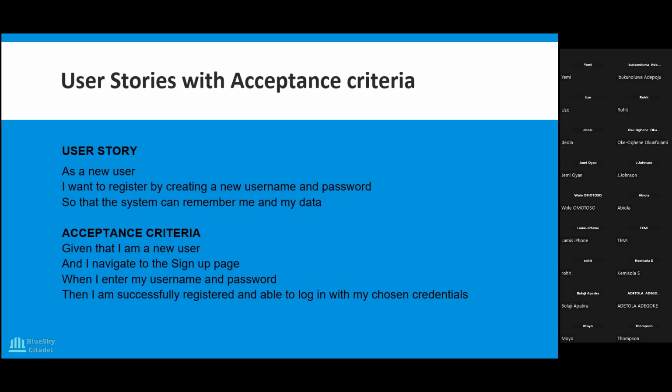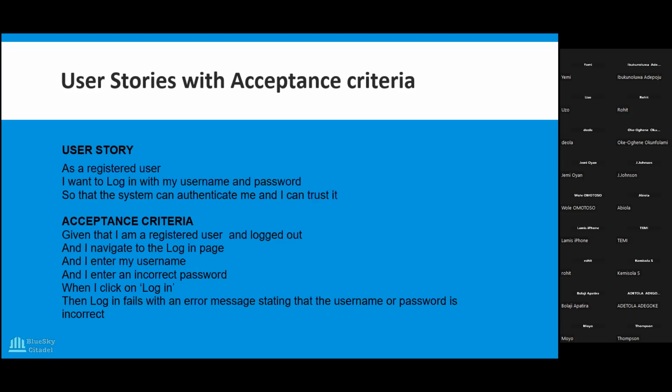Sometimes you might see a message, isn't it, that says your registration is complete, or thank you for registering. Or sometimes you will see an email sent to you, isn't it? A personal email. So given that I'm a new user and I navigate to the sign up page, when I enter my username and password, then I'm successfully registered and able to log in with my chosen credentials. Okay, right. Let's do this.